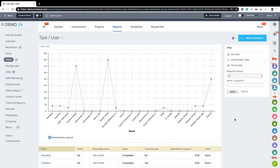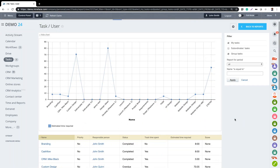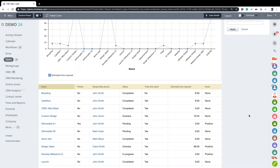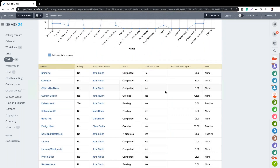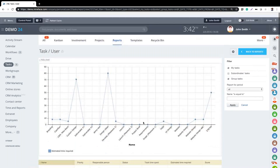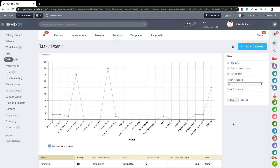Within task reports it's possible to generate a custom report. Here I can see all my tasks, with estimated time required shown as a table on the left and displayed line by line in a chart underneath.